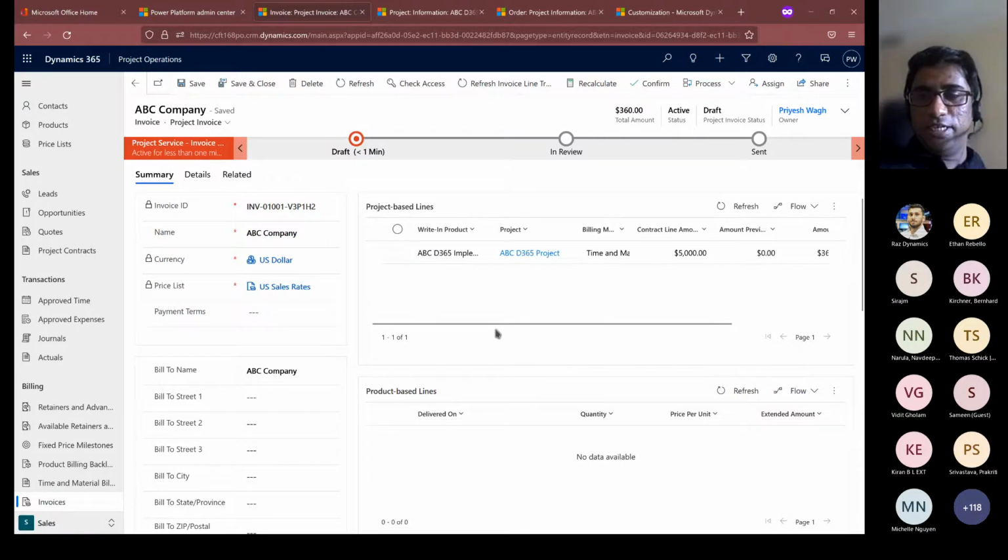And this is where you go all the way from lead to opportunity to quote to creating a contract, tying the project onto the contract, adding the resources on the project, allocating those resources on the project, those resources then doing the time entries or any expense entries they might have, a project approver approving those time entries or expense entries, or the billing administrator, probably the project manager who has the right on the project, can come in and mark the actuals as ready to invoice.